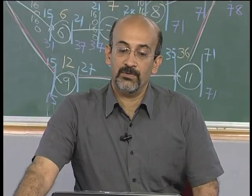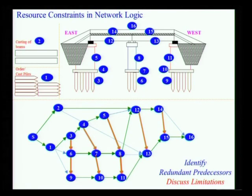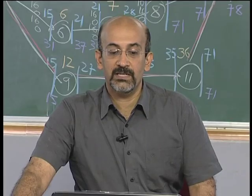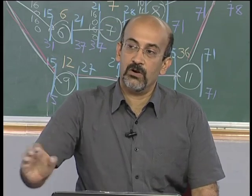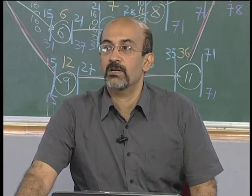I will have to take the maximum. So this is the alternate without redundancy is removed, this is the network, this is with redundancy. Now, will my analysis change with this? If I have this versus this, will the analysis change? When you actually do it, the early start, you look at the maximum. No, it does not matter. It really will not change, but when you have redundancy, your calculations increase. Your network complexity increases.